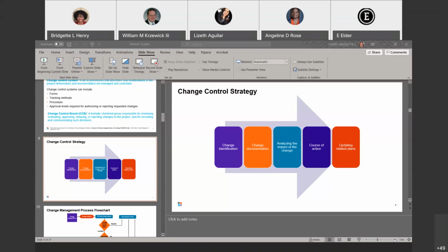Like with the stakeholders communication strategy or communication plan? Yeah, you would look to your communication plan and how you're communicating it. So depending on the appropriate level of communication, the change control board would notify the right representatives from each functional area. They could, right? Or maybe the project manager sends out weekly emails that give updates to those people that, you know, may be impacted by changes. I mean, there's several different ways you can do it, but it does basically require you to address it in your communication plan, right?